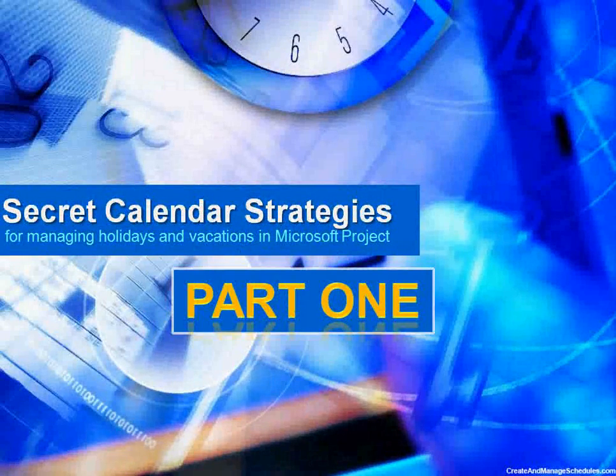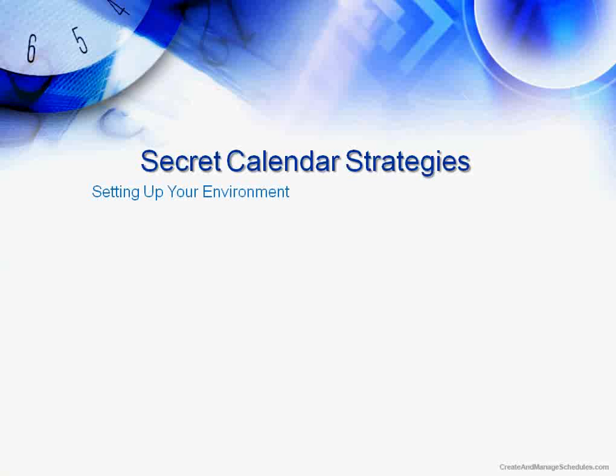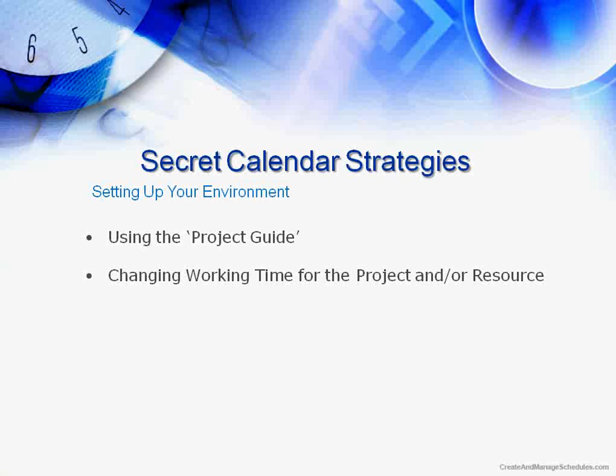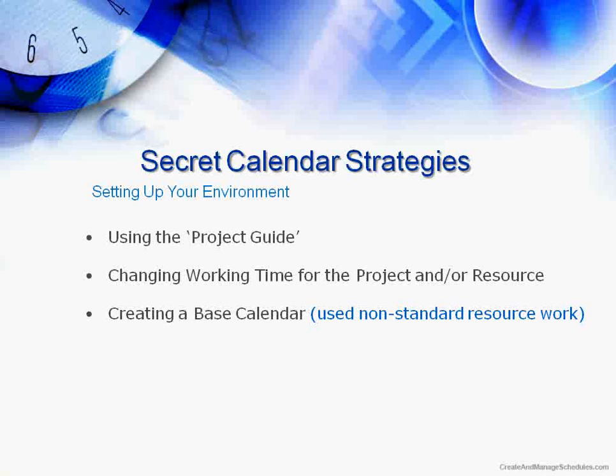In this video, we're going to focus on the secret calendar strategies for managing holidays and vacations in Microsoft Project. Now, our focus is going to be first on setting up the environment. We're going to use the project guide, which is a very powerful tool that comes with Microsoft Project. And we're going to walk through changing time for the project and for resources on the project. And we'll focus on creating a base calendar, which is used for storing dates that are non-standard working dates. So for example, if you have a resource that works 3 days a week, then you would create a base calendar for them.